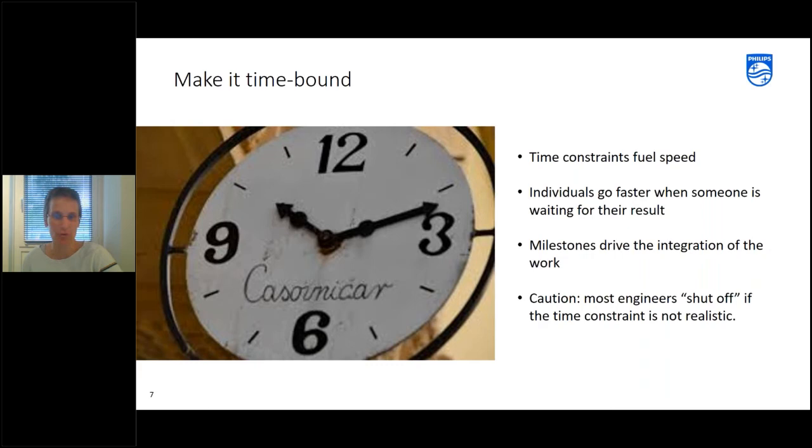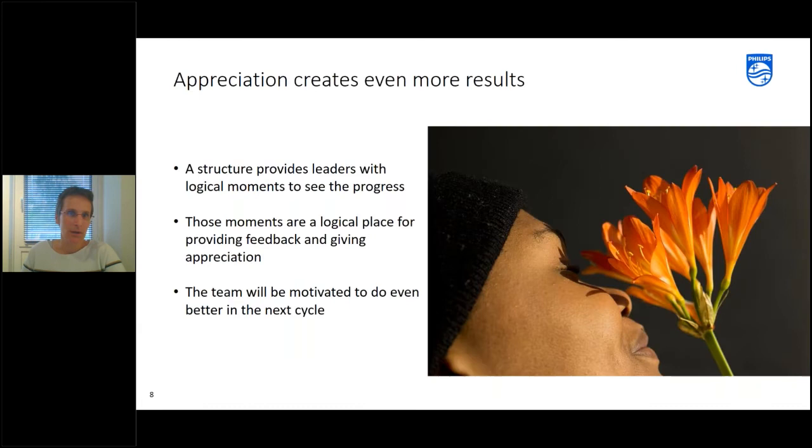Milestones help to integrate the work. Integration of work is really important in structure. So it helps to figure out what are all the bits and pieces and put them together to see whether the puzzle fits or how the puzzle might fit. On the other hand, there's also a place of caution on this time bound. Because a lot of engineers, most that I know at least, they shut up when a time constraint is not realistic. So if there is a great idea and the business leader starts chit-chatting about he would like to have it in half a year where a normal development time might be one and a half or so, then engineers think, yeah, let it go. So then it doesn't work. So the time constraint needs to be realistic in a way.